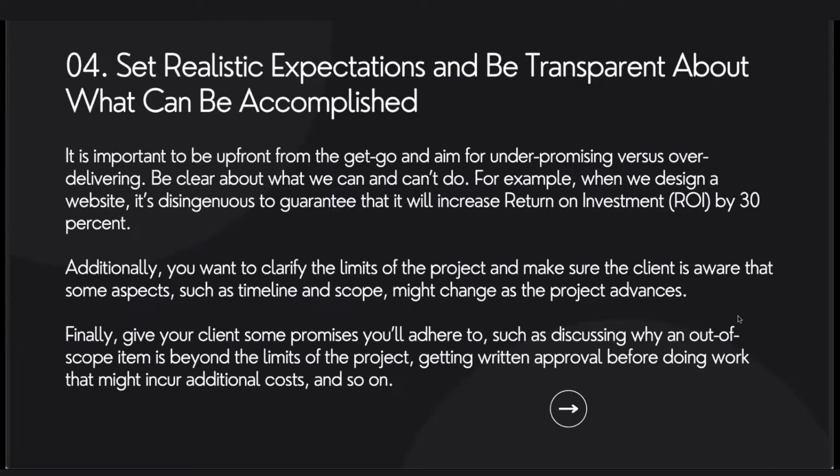One case scenario is we have a project created, you sold the project, and we're dealing directly with the agency, or the agency brings on the client, agency disappears, and we're not saying gone forever, but really not being interactive. We need that information back at a certain time. If we send you a first draft, we need it back in, I don't know, 48 hours, 72 hours, not 3 months from now.